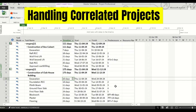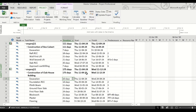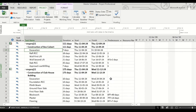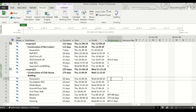Now you can see one thing: if these projects are correlated — maybe you are using the same resource for these two projects and you need to correlate a task of one project to a task of another project. Suppose you have only one excavator and you want to link the excavation of the clubhouse building with the excavation of the box culvert. You cannot do this in the general way that we use when linking two tasks of the same project.